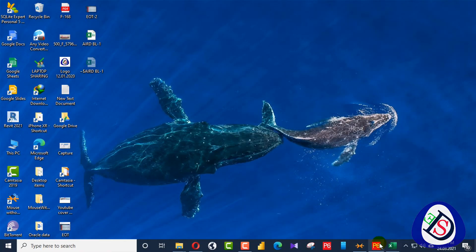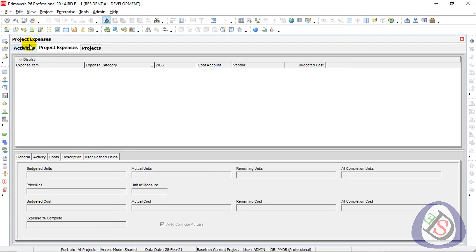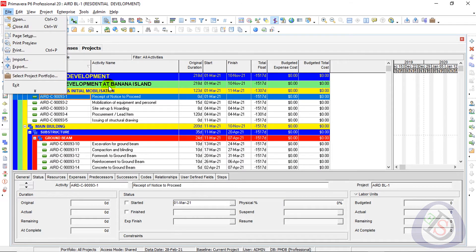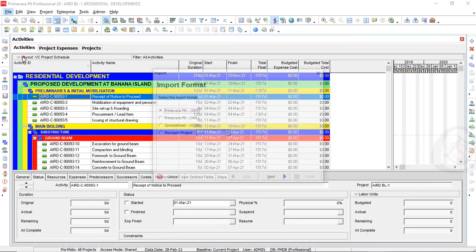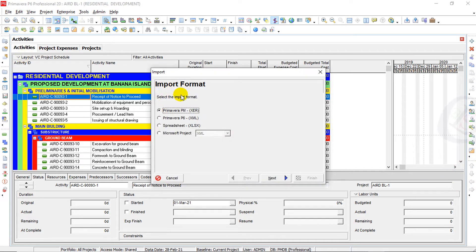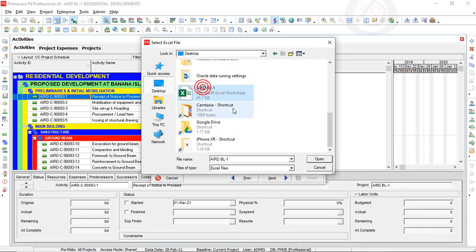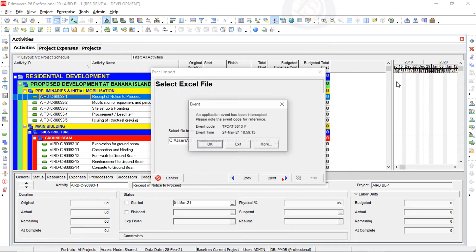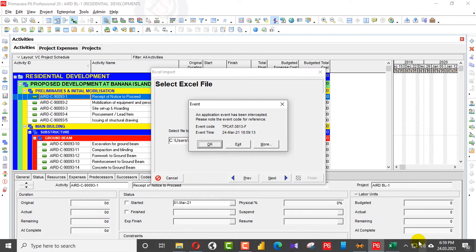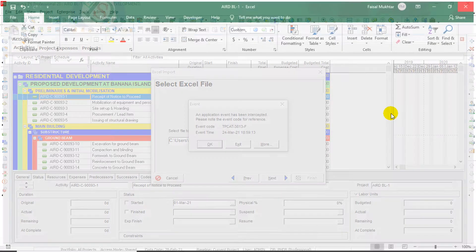Back in Primavera P6, I go to the Activities tab, then File > Import. Under Import Format I select Spreadsheet XLS and click Next. I select the file BL1 from the desktop and click Open. An error appears — this is because the Excel file is still open. I close the Excel file, press OK, and proceed.